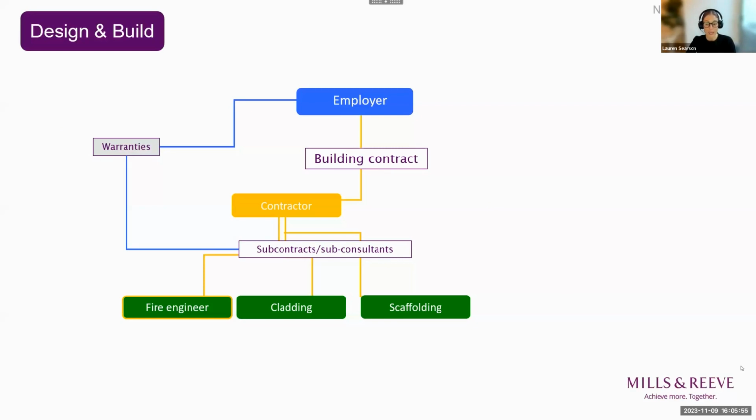Another word is a turnkey solution, provided it's done properly and the contractor does actually take on full responsibility for the design and build. It's probably best for projects with a well-defined scope of work. The contractor, in return for a lump sum price, not a fixed price, undertakes and is responsible for both the design and construction of the project. In other words, the client hires a contractor to perform both the design and construction under a single contract.